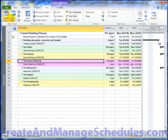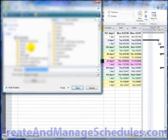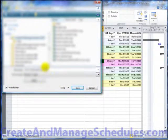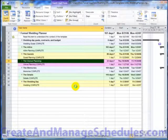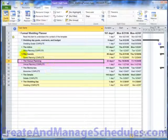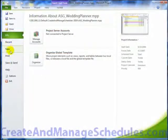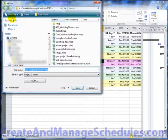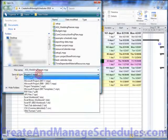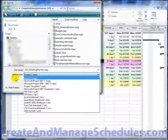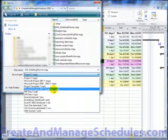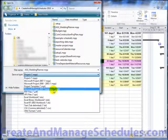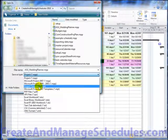Again, what I would do is go to the File menu option, save it locally. I'll just keep the same file name. And then once I make some modifications here, I would go to File, Save As, and literally save it as a template by changing the Save As type here. There's a couple of options. There's a Microsoft Project Template 2007 and there's also just Project Template.